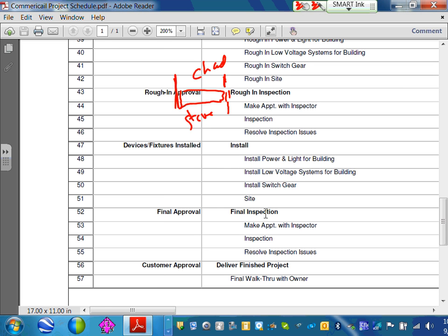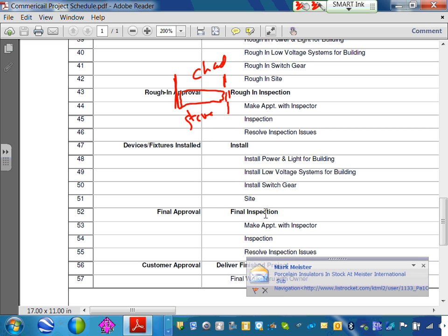Okay, rough-in. And then after you do roughing, you call the inspector and say, hey, we finished roughing. Come and look at the cables and the installation. Check, done. Then go to the next station. We wait a couple of months. Sheetrock, paint, everything's good. Now we're going to put our devices. Bam, bam, bam. Put the devices. We're done. Call the inspector. Come, we're final. Give us final inspection. Walk in, final inspection done. Am I making sense? That's the process of your construction.